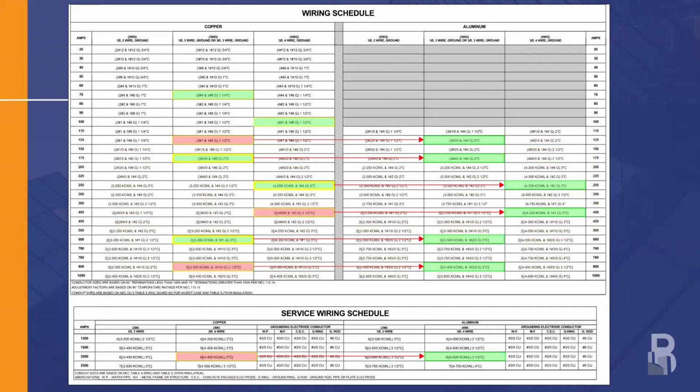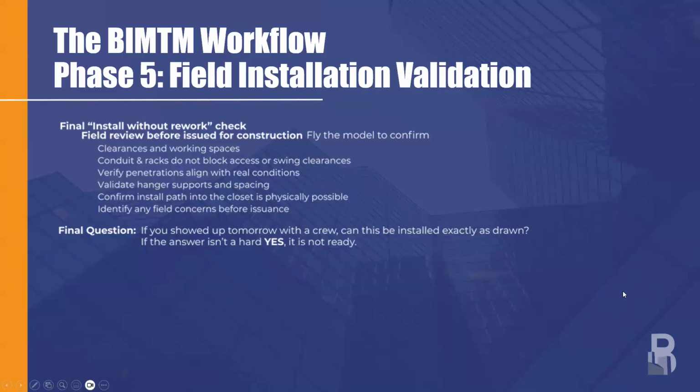And so it was that learning that, if there are standards, box sizes, like what are the standard box sizes that your supplier has on hand that you can get? That's information to know, so you don't have a random size that needs to be a custom built $15,000 box. So those are types of things to be mindful of in the checklist, and those types of things that are good to bring to the table early and track and have an understanding of the build.